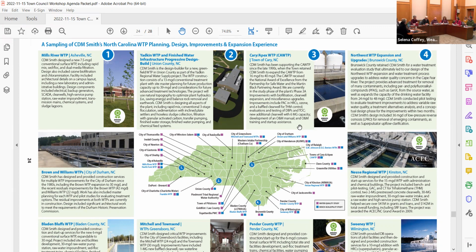So if we recommend going ahead, which I certainly would, it becomes a gate: in 5 weeks we'll know whether we can keep going on the path we're on with supplemental water or not. And that's going to help guide us with these other options pretty quickly. Mm-hmm. It'd be really good to have it recertified in our lifetime. Yes.